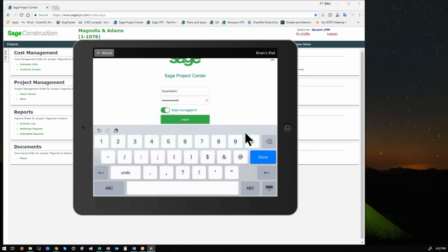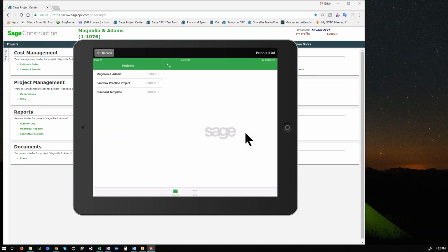So when you go back into an old one and you edit it, does it show that it was edited on that date? No. So if you want to do that, I would create a whole new one just so you have the history of the first one. Like if it started raining in the afternoon, I'd have a morning one, then create a second one to log that it was raining. He wants to see when.